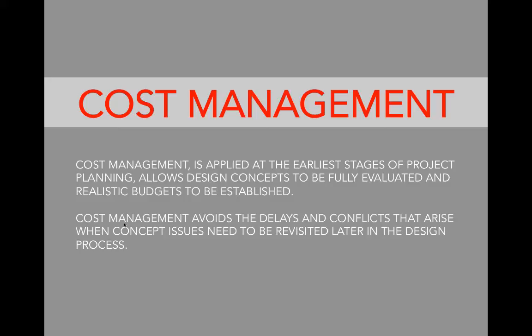For engineers and architects, there's a big expression of interest, an RFP submission at the end of this month, where you have to create teams, answer questions about who's going to do what in the process, develop schedules, and develop a methodology. They're asking for a schedule from start to finish of 27 months, which is really fast for a project that size. And this really comes back to management.